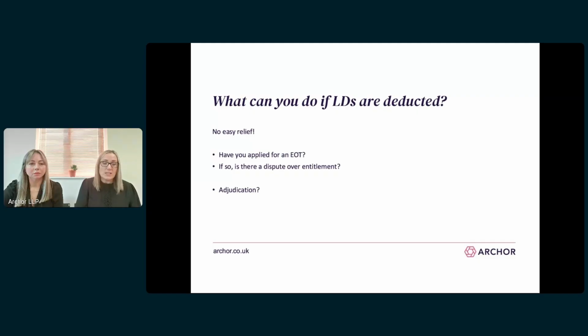So what can a contractor do if liquidated damages are deducted? Unfortunately, there is no easy relief. If there's an entitlement to an extension of time which would reduce or eradicate the liquidated damages, then the contractor should apply for this straight away if they've not already done so. If there's a dispute over that entitlement, it might be necessary to refer the dispute to adjudication. But unfortunately, there's no quick or easy fix if liquidated damages have been deducted.